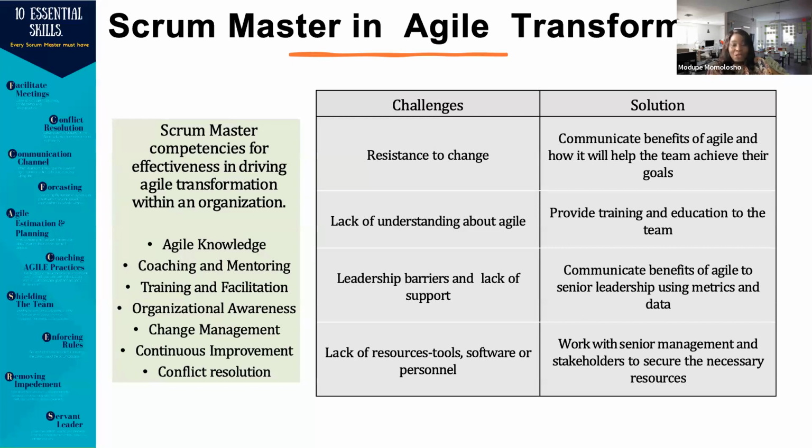to deliver value. Because if you pull somebody from somewhere to come and support another team, before they can even go through that learning, they are losing time. The company is losing money by that. But if they stay with the team, they understand the application they are trying to build. They're persistently working together with other members. You get value faster, and even you get the benefits, right?